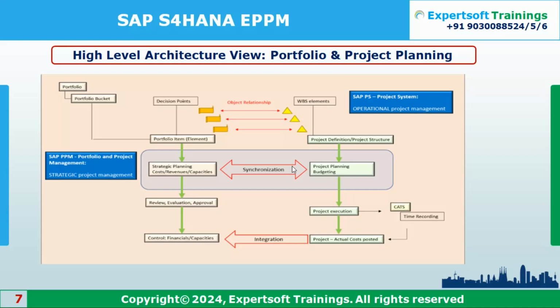My doubt is, we assign budget on the item level, not on the bucket level. An item could have multiple projects below that, right? So that is two-way. As I said, if you're doing the budgeting exercise from the bucket level, you can distribute it into your lower level. If you want to do it on the item level itself, you can do that. Or, as I said, if you did your budgeting in a third party tool like Primavera, you can transfer that back to your item level, and it will show you in the bucket level too.